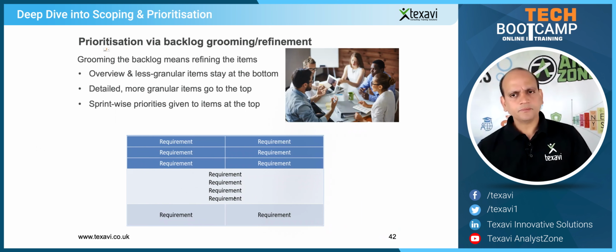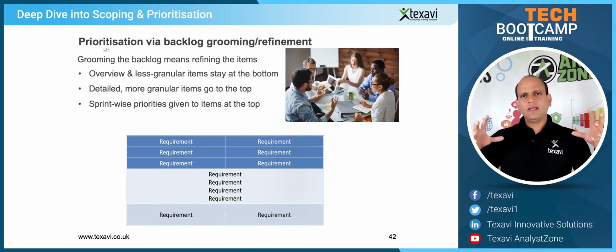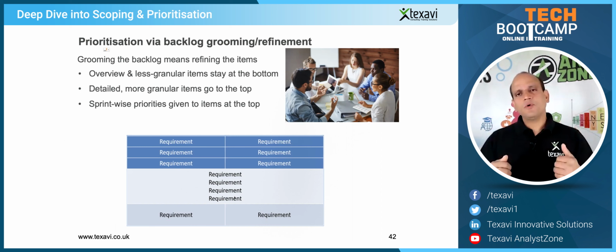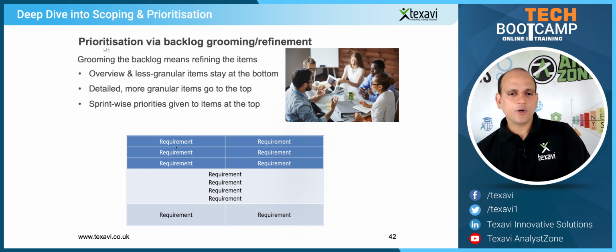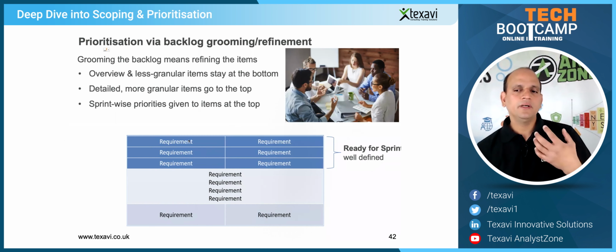From there, what you try to do is get deeper and deeper, from the epic level. You try and create stories, and from the stories, tasks. And the stories at the very top are the ones which are detailed and granular enough for you to be able to assign to a sprint. They're ready. So that's what we call...